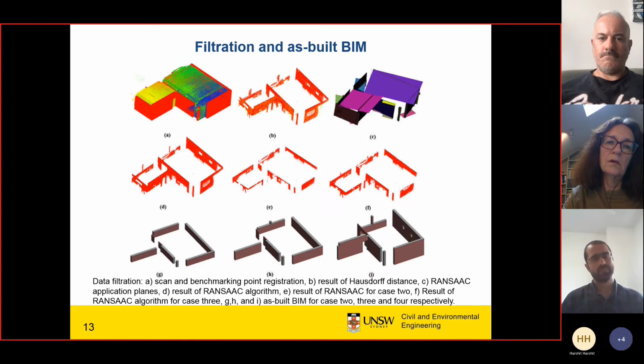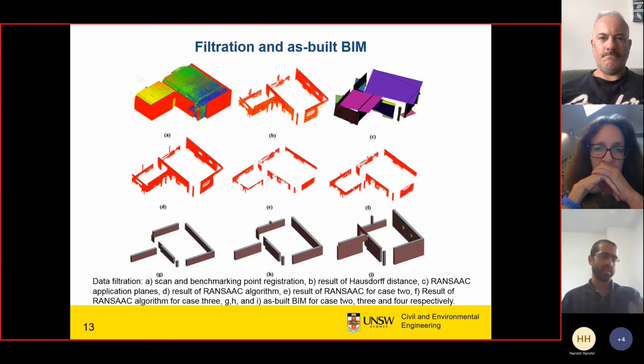Okay. So you are actually only working with point clouds. You compare everything to point clouds and do the analysis, and you decide which walls are constructed only on the basis of the point clouds. Yeah, which wall is constructed, which wall is ahead of the schedule, which wall is on the schedule, and which was behind the schedule, because we compare with the as-planned model.